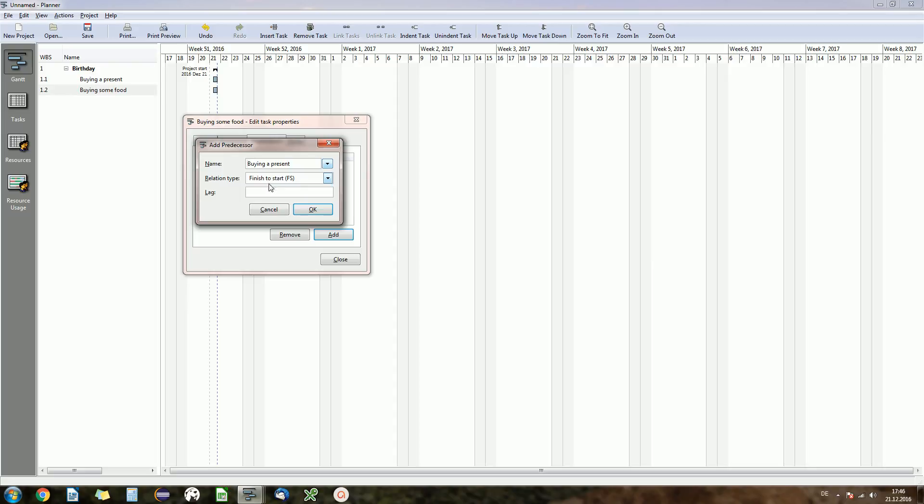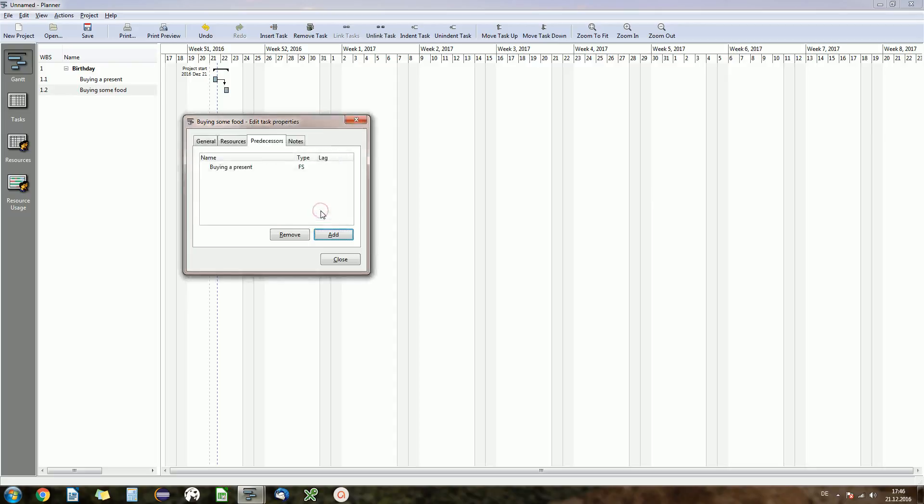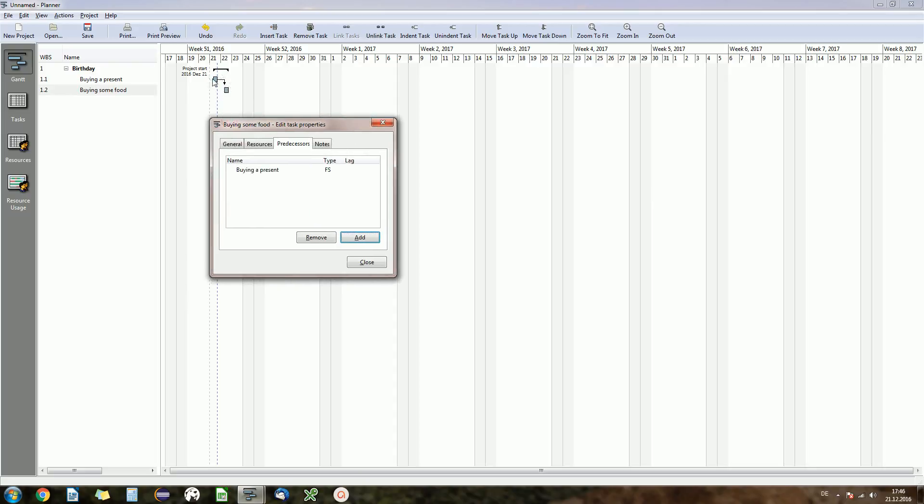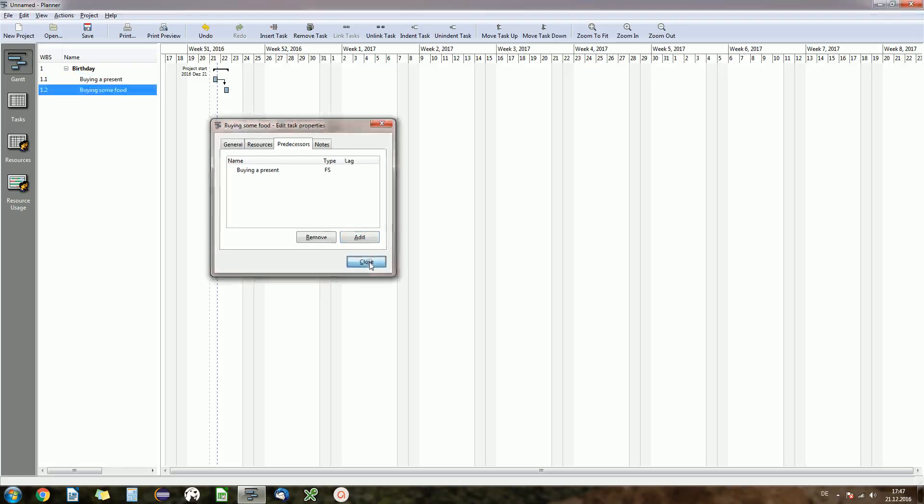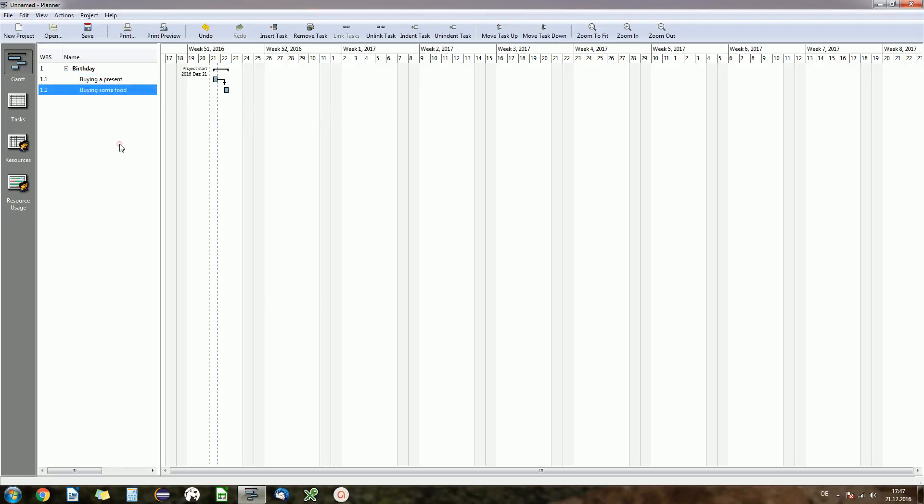Okay, that's it, finish to start. You have some other options here if you want to, start to start maybe, you want to have parallel tasks and start them both together. But we want to select finish to start here, click okay. And you see what happened is our tasks got connected through the arrow and now we have first task buying a present, second buying some food, and that's our order.